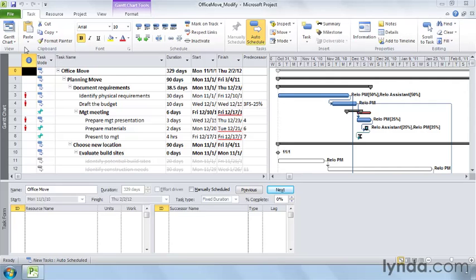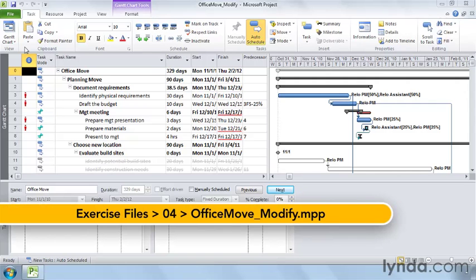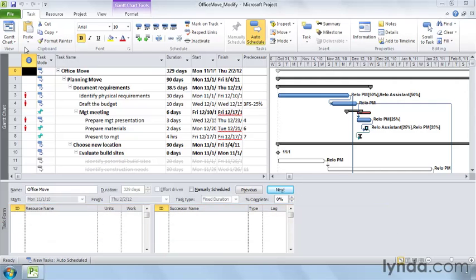After you assign resources to tasks, you have to make a second pass through your schedule to make sure your resource assignments work. Workloads have to be just right, so you keep your team members busy without burning them out. The Gantt chart, the task form, and the Assign Resources dialog box that you use to assign resources focus on tasks and assignments for one task at a time.